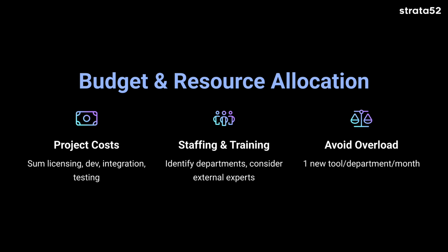So if a high priority project threatens to overlap with others, and it could mean that everything else derails because you're focusing on this high priority project, then be sure to stagger the rollout of any other tools, or know that you have the option to hire additional support, so that way the tools can get released in the cadence that you had planned.